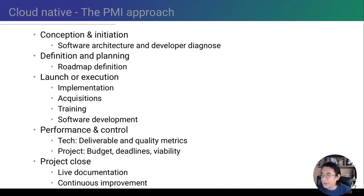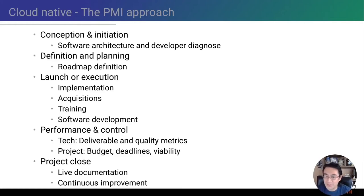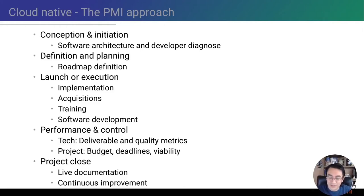So what was my approach? My approach was the PMI approach — the Project Management Institute approach. When I faced this challenge, I started to question myself: how do I tackle this problem and do it successfully, considering I had done some pieces of this in the past? I did research and matched many PMI phases to actual migration project phases. The classic phases — concept, initiation, definition and planning, launch or execution, performance and control, and project closing — were matched to different phases of a traditional-to-Kubernetes migration or Docker-to-Kubernetes migration. I found some interesting facts about how to do your migration and how to face this as a project in order to have a fairy tale and not a nightmare.